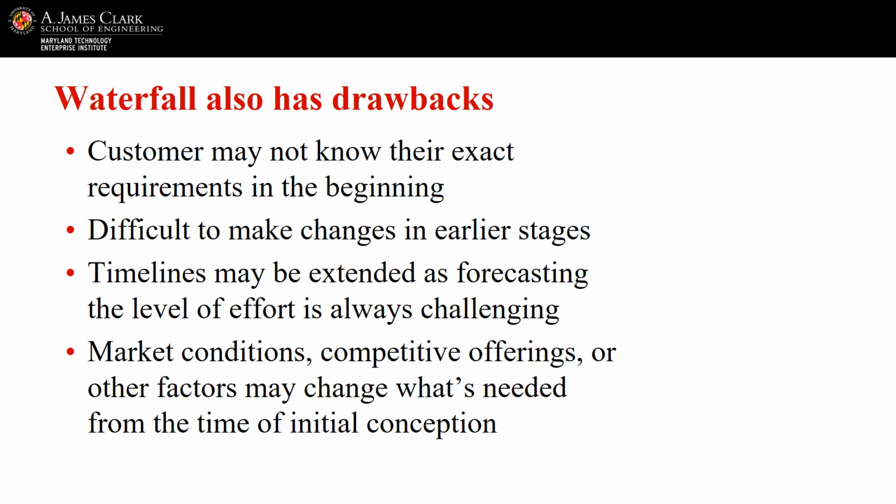Secondly, after the requirement stage, you might find new data that affects the product, and Waterfall doesn't let you go back upstream to change decisions in earlier stages. Third, one of the most common problems is that there were technological unknowns, and coding the solution took much longer than intended, so a 3-month project actually took 6 months to complete. You had to invest those extra 3 months because otherwise you wouldn't have a product.